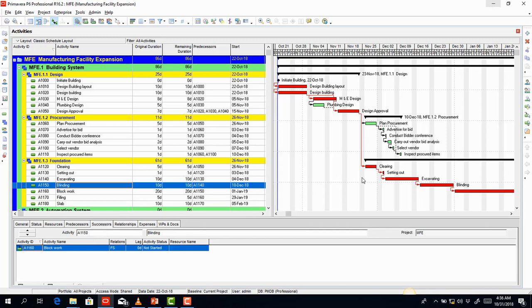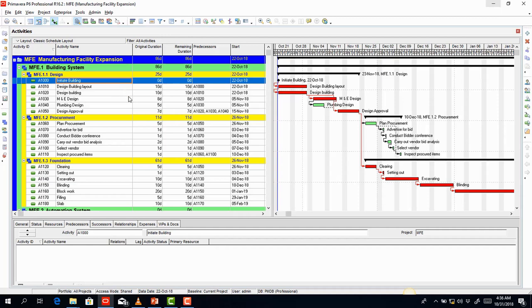That's essentially what the successor does for you. So if you want to use successors, that means you will have to start from predecessors and then assign successors to it. Whichever way you choose to assign or create relationships for your project is just fine. But most importantly, be sure you get it very well. And usually, for a beginner, you may want to first create your project relationships on an Excel sheet or on a piece of paper before you begin to feed it into your Primavera P6 so that it works effectively for you. I wish you the best in your scheduling career.